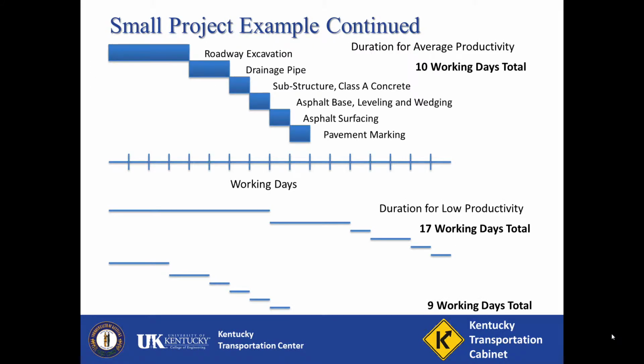The data from worksheet 2 can also be prepared in visual format as seen here, the 3 bar charts. This method of review, especially if weekends, holidays, and other times are included in the schedule, allows for reviewing the contract time estimate with constraints such as local events and other times of work restriction.